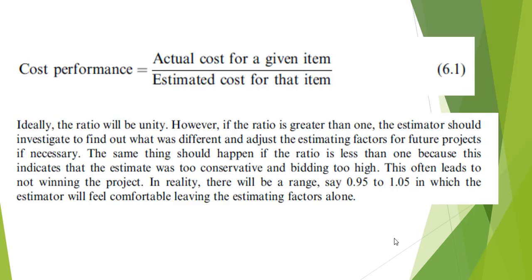Every time you'll be starting with a different seed value, and each answer is going to be slightly different, and you're going to take those 100 or those 1,000 runs and average them, and that'll give you the actual cost for the given item. So each of those values is going to be different, and every time you run the model it's going to be different. But if you can get between 0.95 and 1.05, that's probably more than accurate enough for taking care of business.